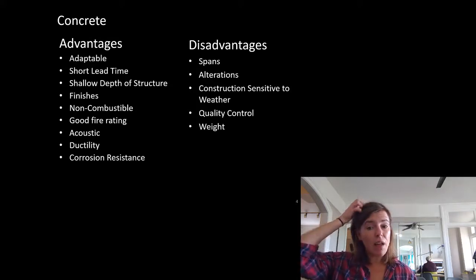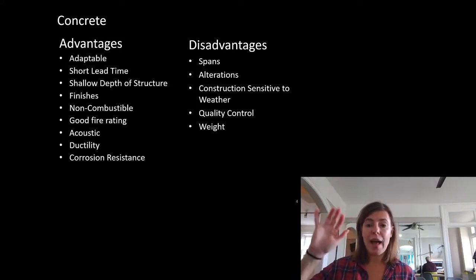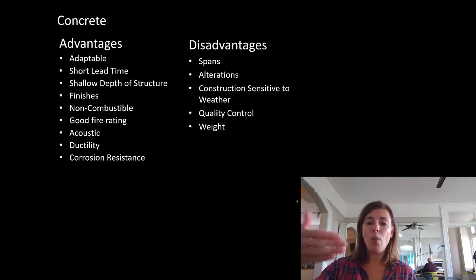In fact, a lot of concrete buildings will have a third-party review. Actually, most construction does, but for reinforcing, there'll be another person on either the contractor's behalf or sometimes even on the owner's behalf that will come and write a report to see if the steel embedded in the concrete matches the contract drawings.